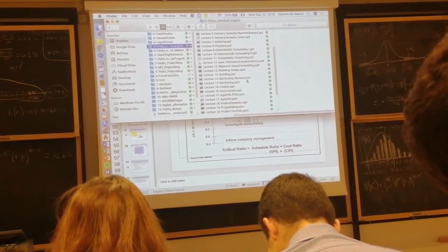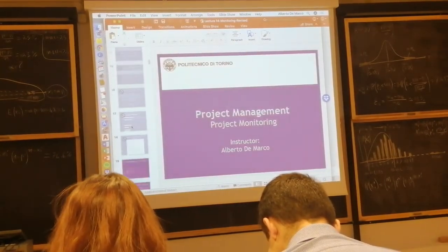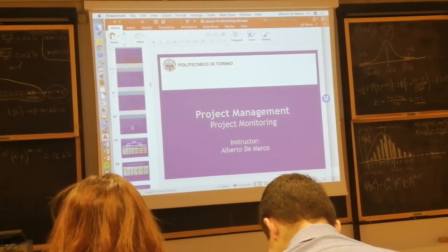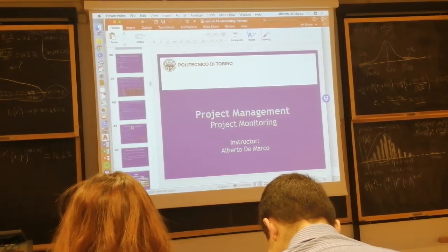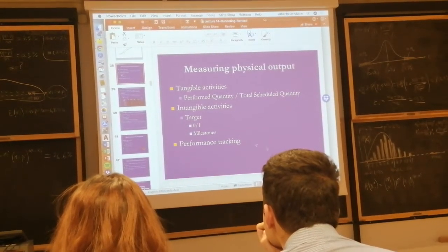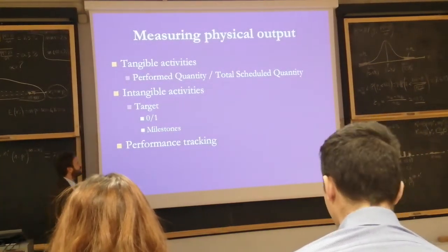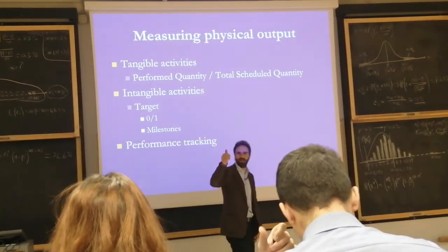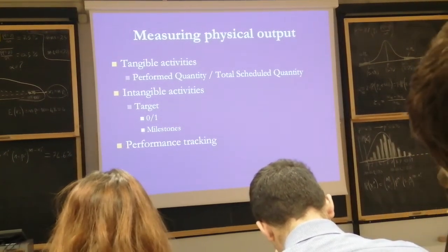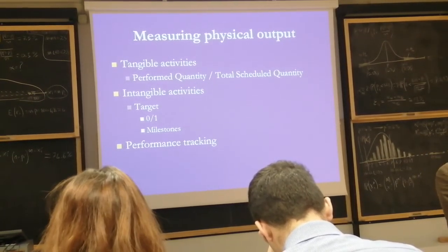But when it comes to measuring non-physical, intangible assets, what would you do? How do you measure non-measurable quantities? Output, delivered, non-delivered. The easiest way is 0, 1, like the electric switch. When it's in progress, it's 0%. When it's done, switch, 0, 1. Nothing easier than that.